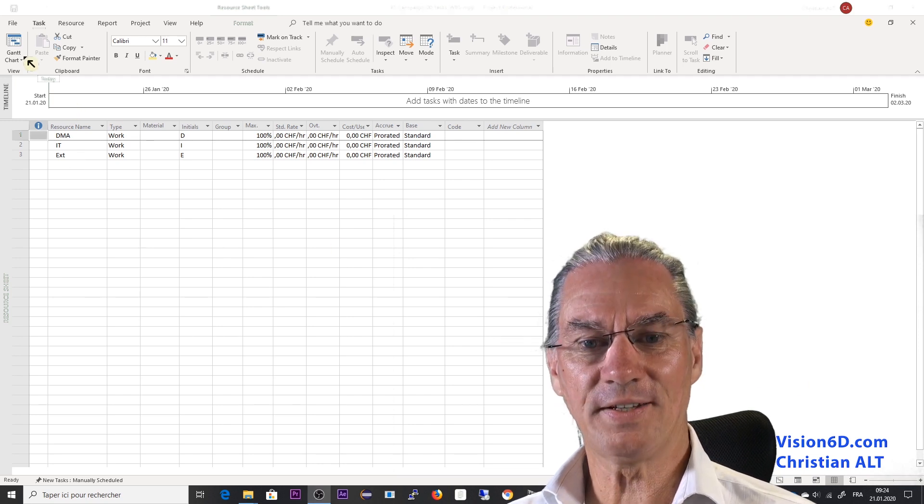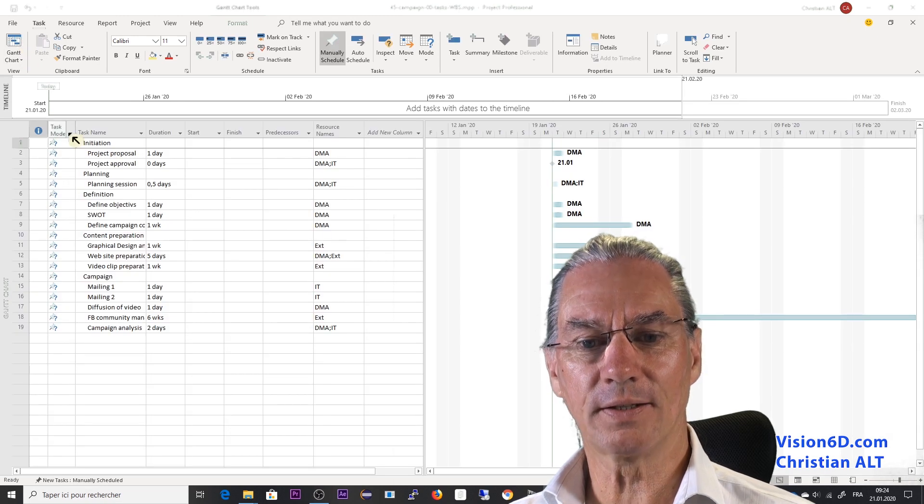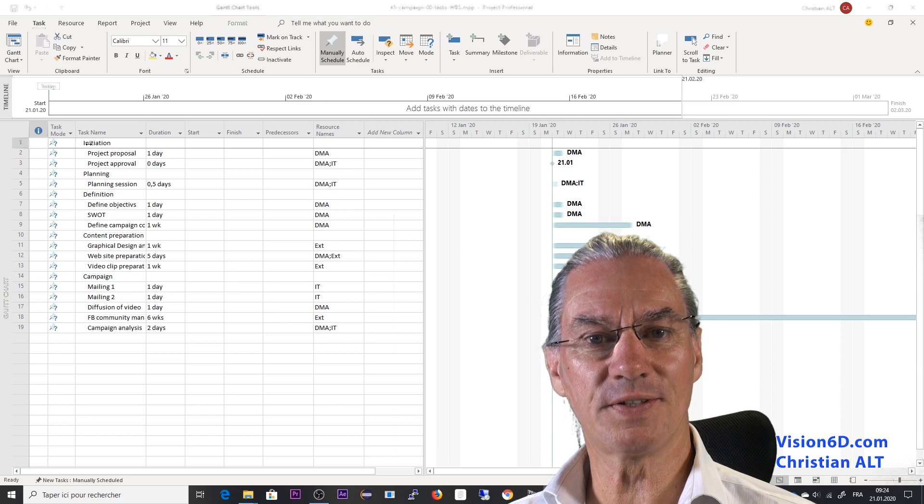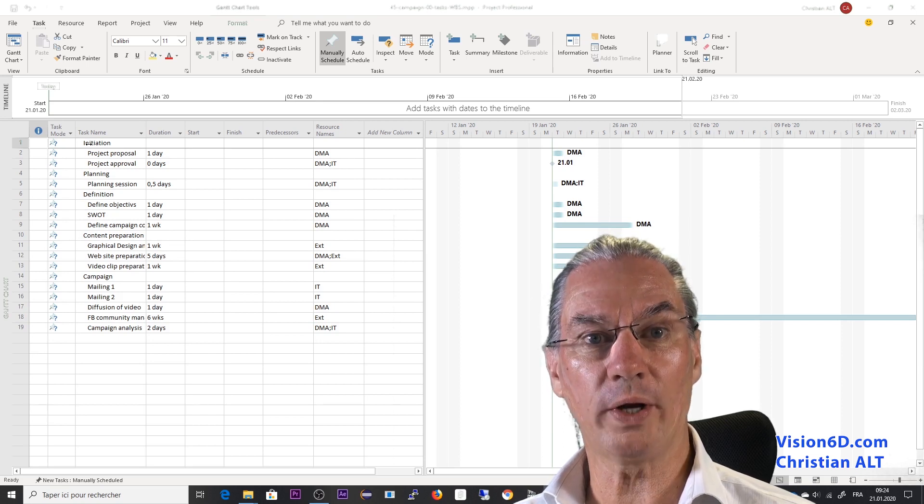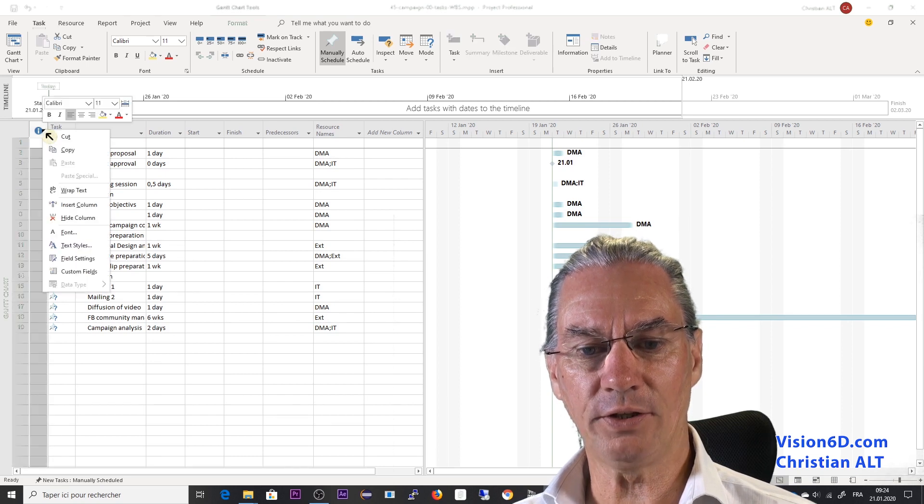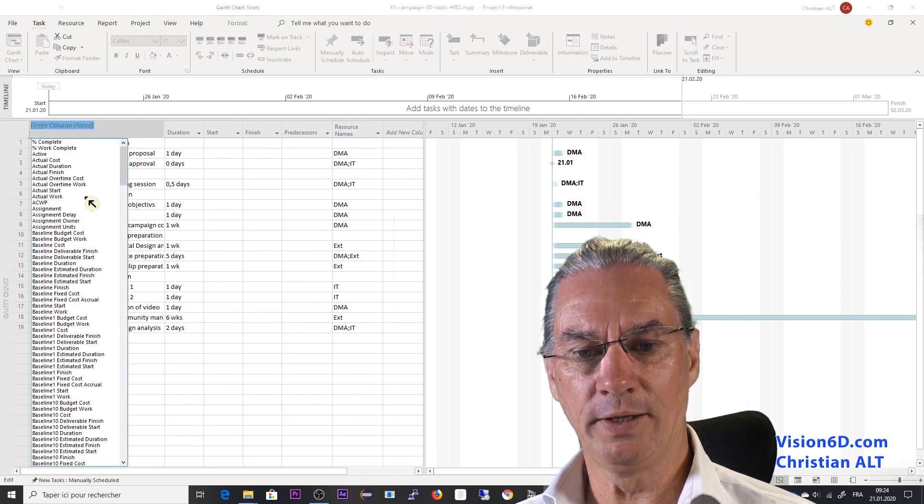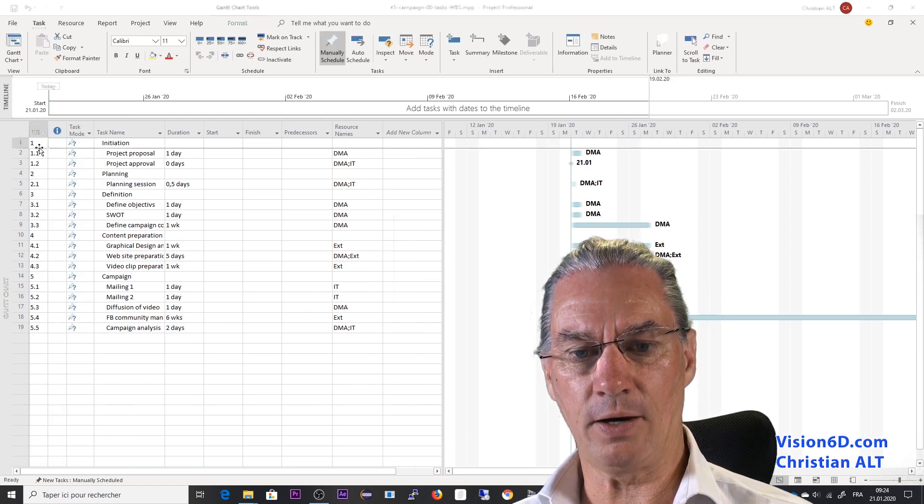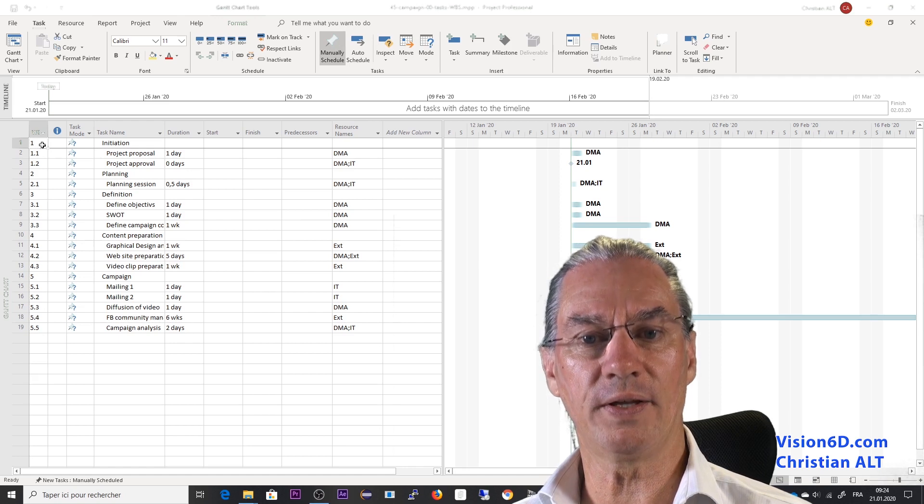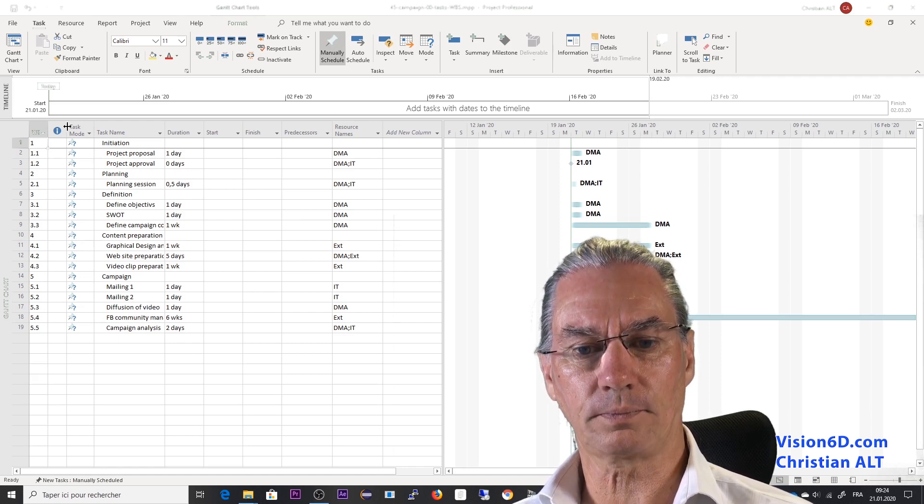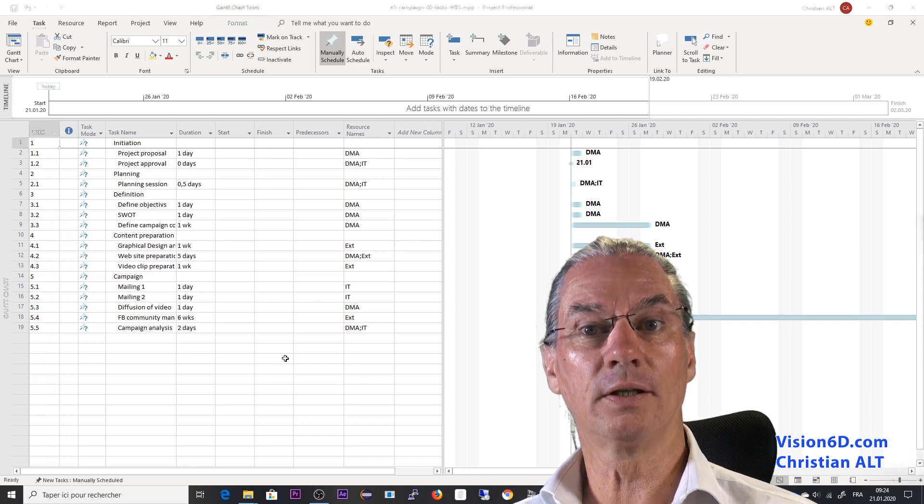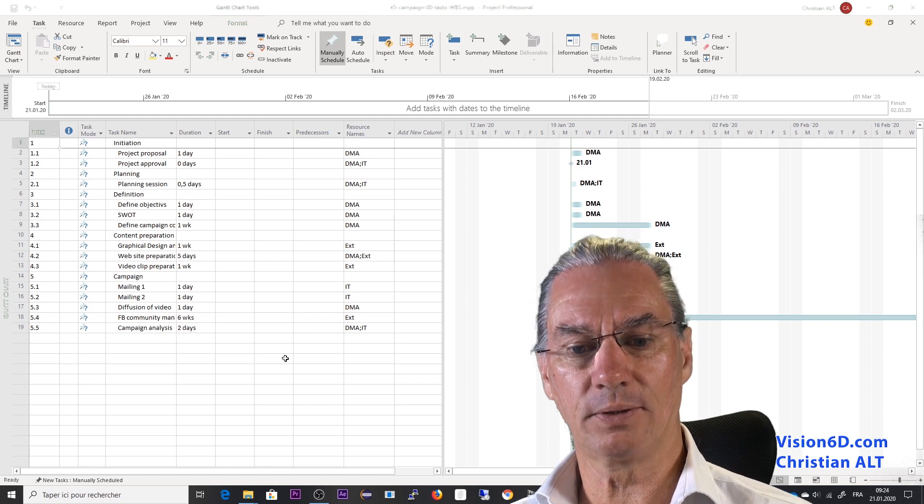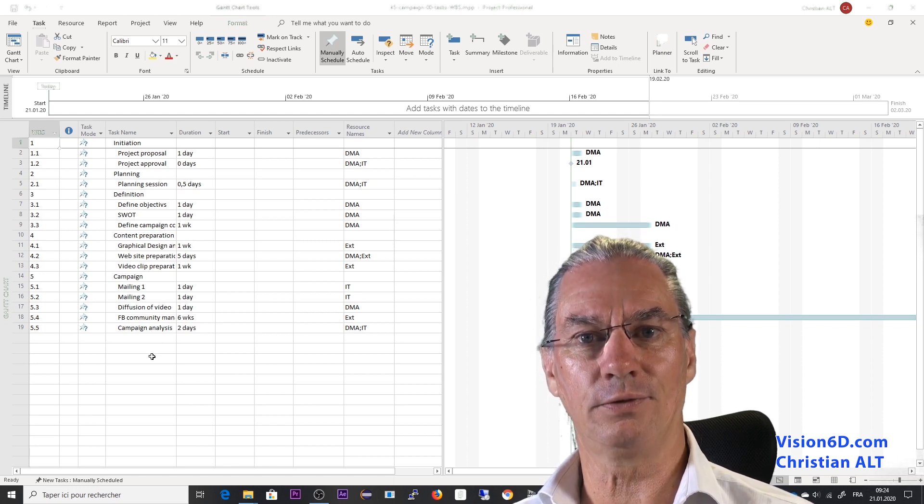One last thing that I want to show you is that you might have noticed that we didn't see WBS. So we don't know whether it was imported or not. So I'm coming here in the beginning and I'm inserting a column and I'm looking for WBS. And now I'm going to insert it and it has become visible. Meaning that every field that we had mapped were really imported into the Excel file.